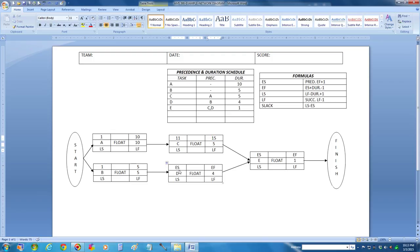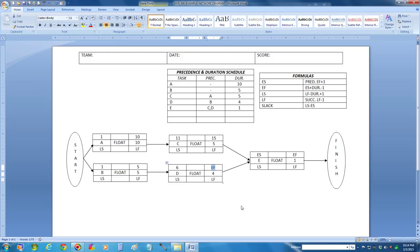Let's move down to task D. Its earliest start time is its predecessor's earliest finish time plus 1, which is going to be 6. So its earliest finish time is going to be 6 plus 4 minus 1, which is going to be 9.